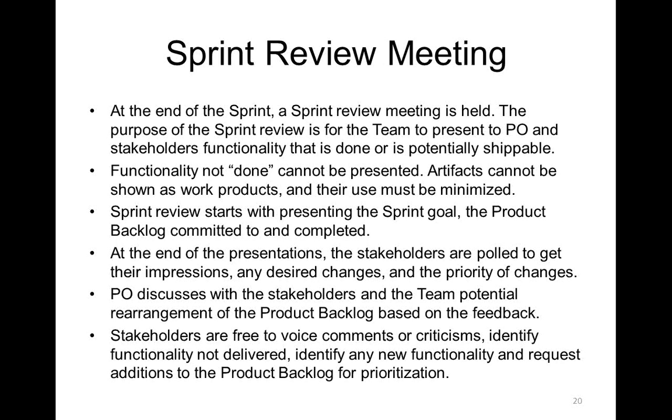So they are not really bothered about any other artifact, any other processes involved, any other related things. The main focus is whether whatever has been completed can be shipped, can be handed over to the end customer. The sprint review starts with a presentation of sprint goals and product backlog, just giving the idea of what all was attempted, and finally presenting what got done.